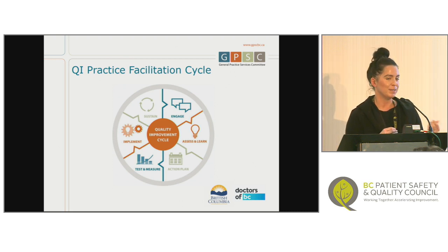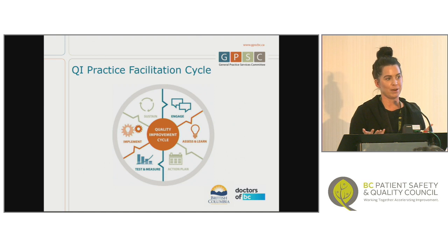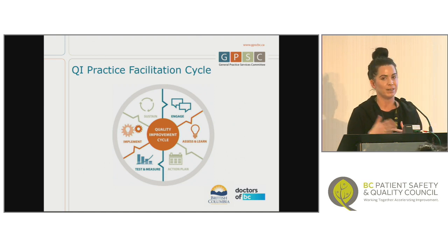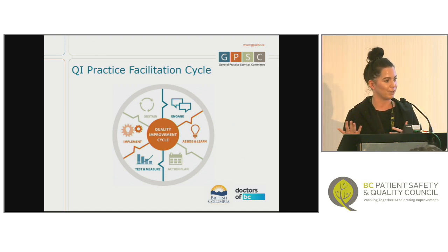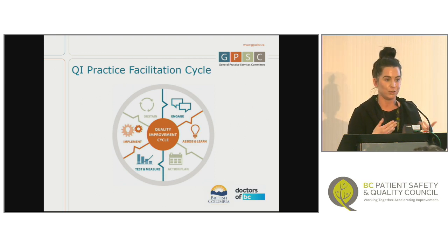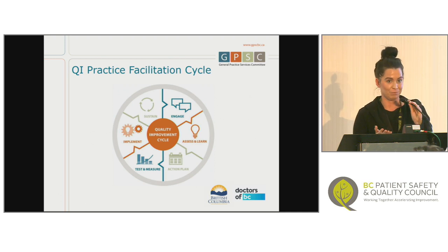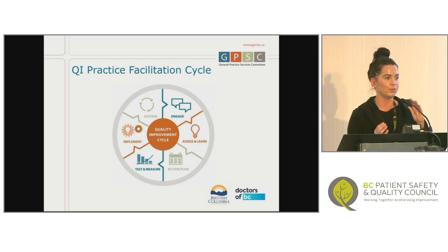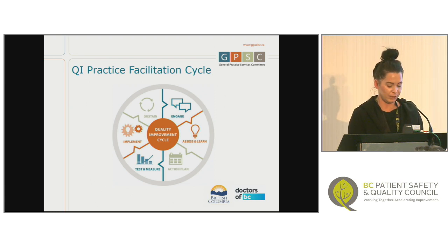It has happened in the past where you have one member of a clinic who's really keen on doing this, but everyone else feels like they're burnt out or over capacity, and it's not successful. So we learned the hard way that these conversations have to be had in this stage, and then it might just be that the coach says, we respect your willingness to do this, but maybe let's readdress this in 6 months. So that's engage. Moving on to the assess and learn.